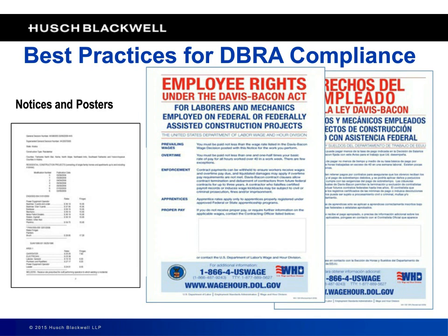Okay, we talked about this earlier. This is a requirement that comes directly out of the statute itself. You've got to post two things prominently on your job site. First thing you have to post is that poster. You can download it from the DOL's website, and you need to put that poster up. And this tells people that, hey, you're on a Davis-Bacon Act job.